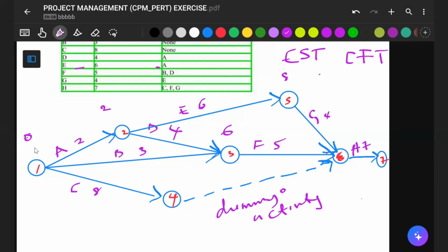It's Daniel. Yes. Looking at your explanation now, the earliest starting time for activity B will be 0, and the earliest finish time, will it still be 6 or will it be 3? Because we are not considering the lowest addition now, we are considering the highest. Yes, correct. Thank you for that question.